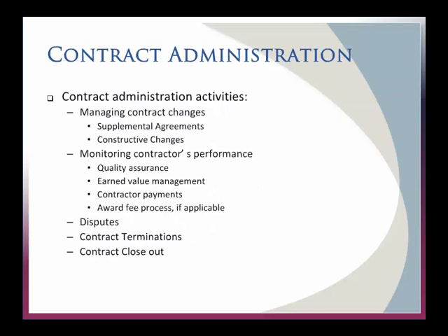So just so you know what's going on in terms of contract administration, you got to manage changes. Changes happen. Very often, what we said we wanted up front changes through the process, and you got to be able to modify it. Remember, you as the COTAR or any other engineering role inside of this, it is not your job to do that. You need the contracting officer to do it, but they're going to need you to help define exactly what that change actually is and is it reasonable.